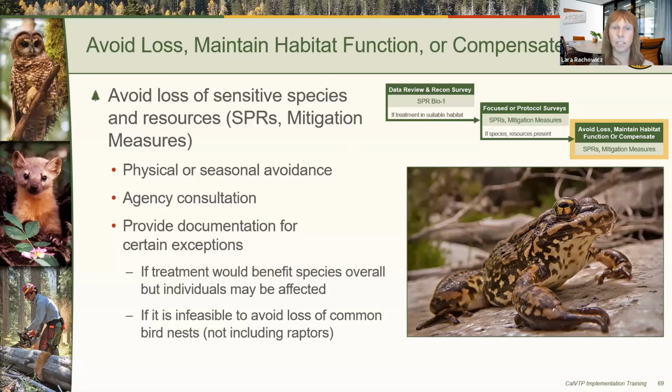For example, mitigation measure Bio 1A and mitigation measure Bio 2A are for plants and wildlife that are listed by the state or federal Endangered Species Act, or are fully protected by the California Fish and Game Code. And mitigation measure Bio 1B and mitigation measure Bio 2B are for special status species that are not listed or fully protected. The measures require agency consultation at certain points regarding resources that are under an agency's jurisdiction or in circumstances where a permit or approval may be required.